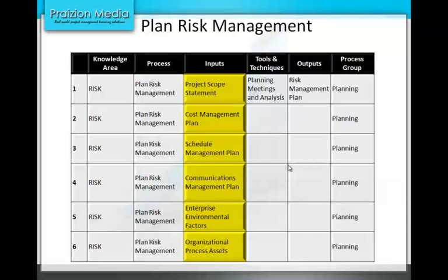Okay? Now finally, definitions of risk, probability, and impact. Different organizations have different approaches to looking at risks. To one organization, if a risk causes a budget or a cost increase of 10%, it could be a huge deal. That could be a high risk. In other organizations, it could be, oh well, that's business as usual. But these things need to be defined, and that is why on page 281 in the PMBOK guide you have the defined conditions for impact scales. Please read it. Absolutely important.